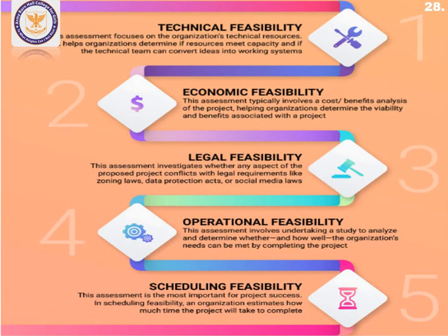plan. In economic feasibility, this assessment typically involves a cost-benefit analysis of all the solutions of a project, helping the organization determine the viability, feasibility, and benefits associated with the project. Legal feasibility investigates whether any aspect of the proposed project conflicts with legal requirements like zoning laws, data protection acts, or social media laws. Operational feasibility involves undertaking a study to analyze and determine whether and how well the organization's needs can be met by completing the project.